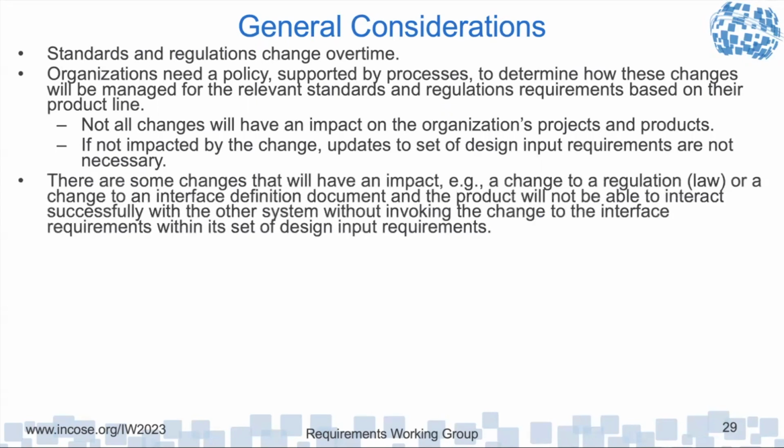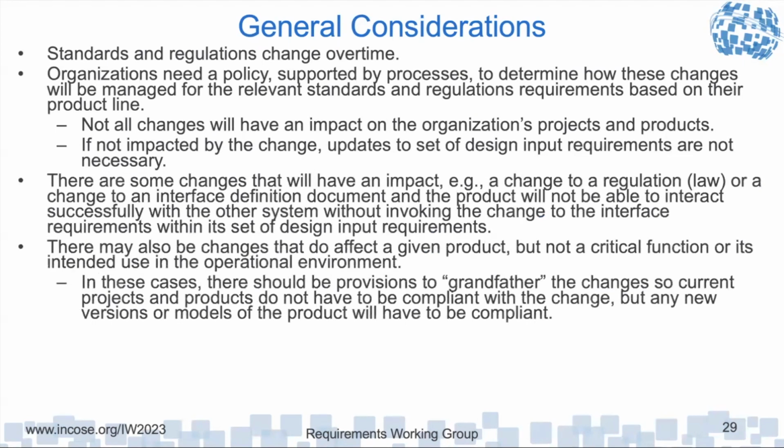There are some changes that will have an impact, and a change to regulation or law or an interface document, you have no choice. You have to change to be compliant with that changed standard or that regulation or the ICD. There also may be changes that do affect your product, but not a critical function or its intended use in its operational environment. In these cases, there should be some kind of provisions to grandfather the changes so that current project products don't have to be compliant. They don't have to redesign something, but any new versions of products will be compliant.